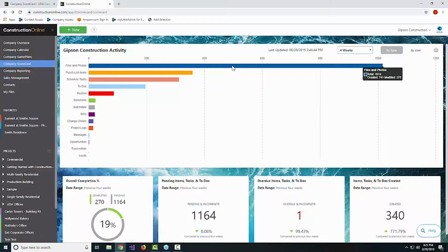We're just looking for big picture information, but if you saw this number much lower, that would be a red flag. You're looking at over the course of a month, so we'd be looking for at least 200 pictures per project. If I've got 5 projects going on right now, we're on target. If I've got 15 projects going on, we're probably not on target. So it just gives you a really fast way to assess that for your team.